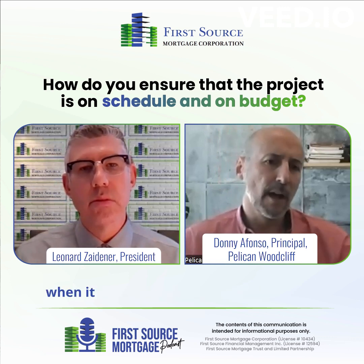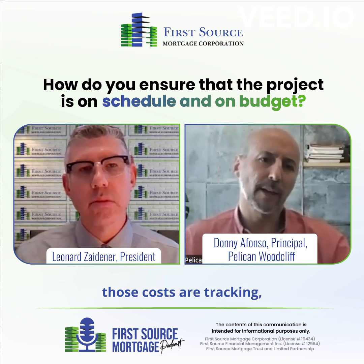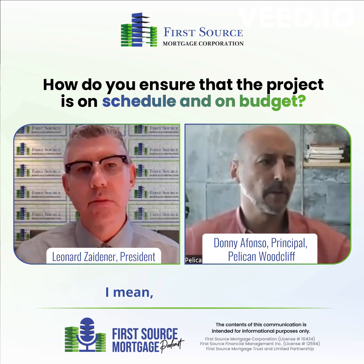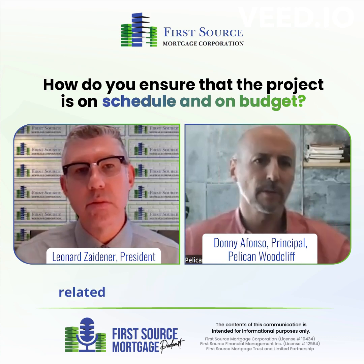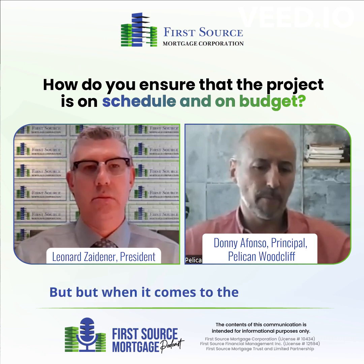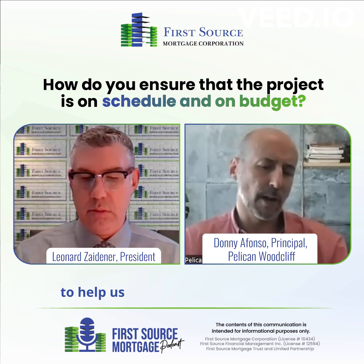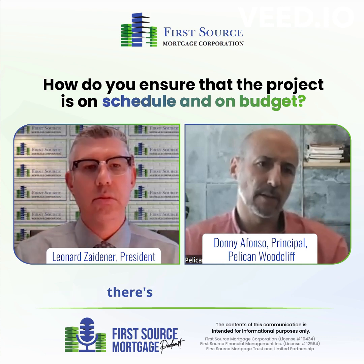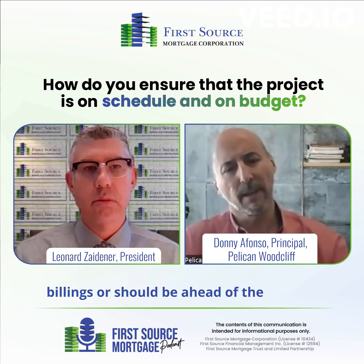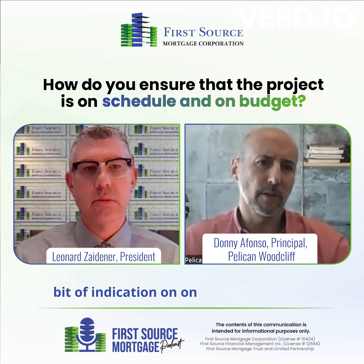The systems, when it comes to review of costs and how those costs are tracking, we do have some tools in the tool belt that we use. I mean, everything that we do is spreadsheet related, except for a final Word report. But when it comes to the checks and balances, we've got some that try to give us an idea on whether there are any trades that are falling behind on their billings or should be ahead of the billings, and that typically can give us a little bit of indication on schedule as well.